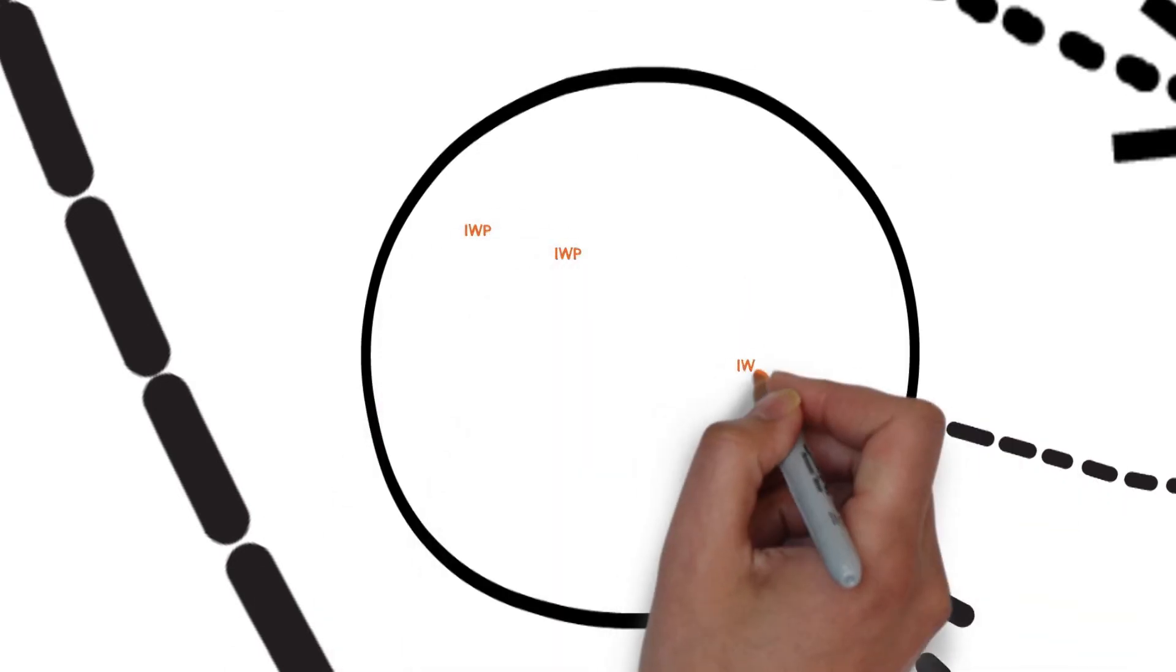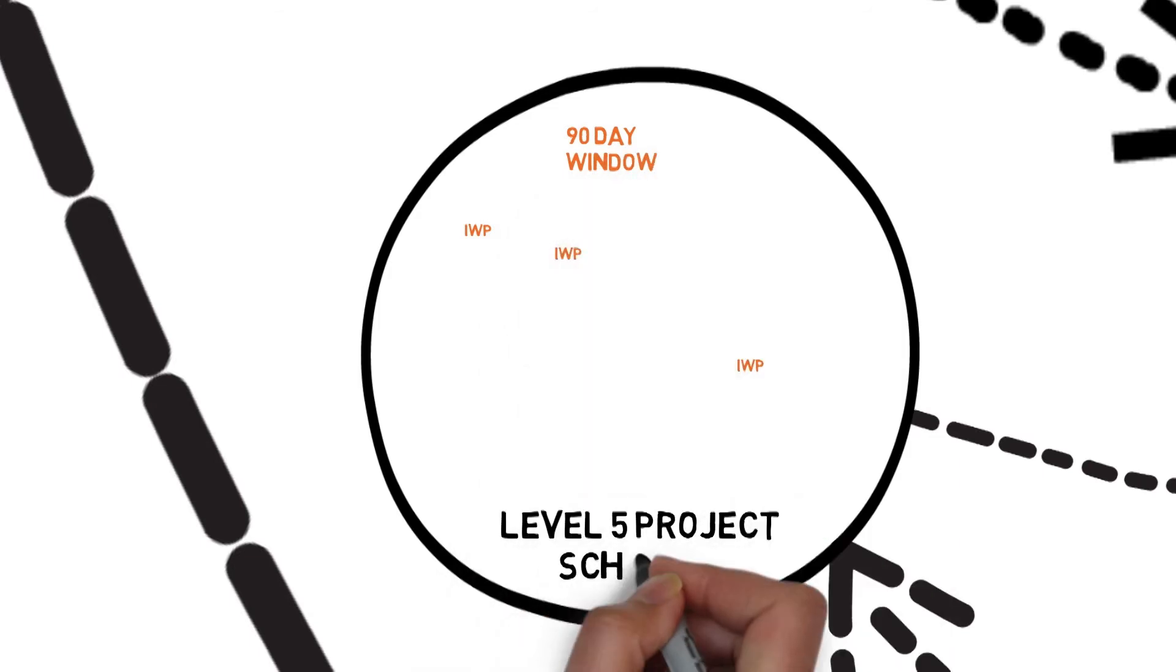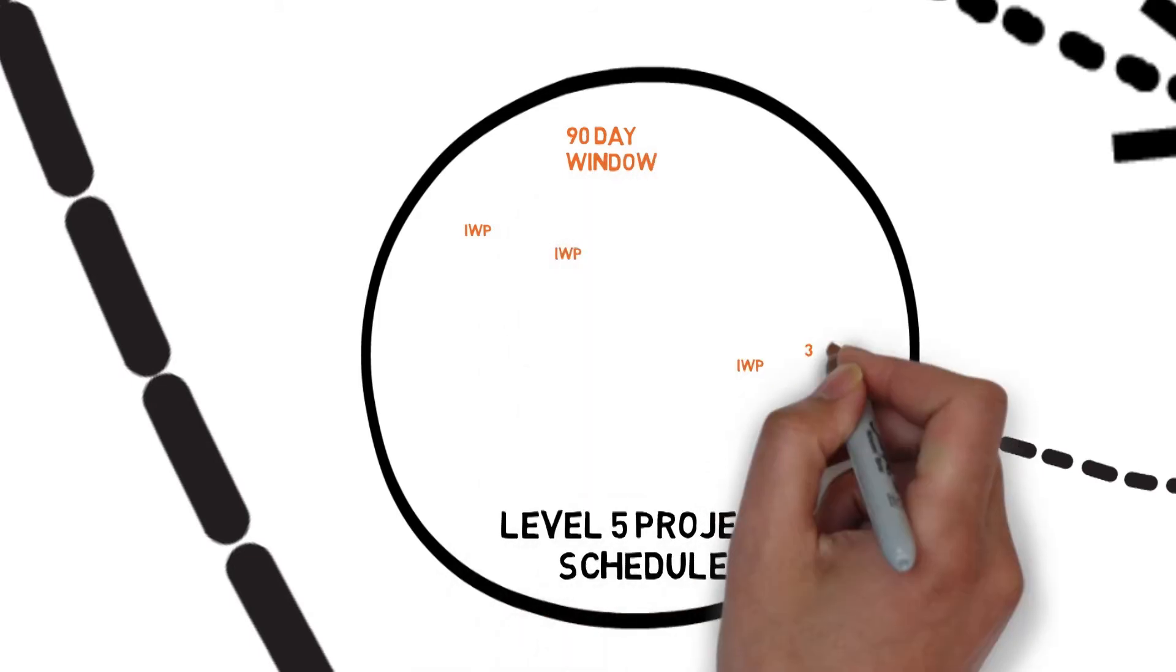The creation of IWPs for each CWP populates the rolling wave 90-day level 5 schedule as individual week-long activities.